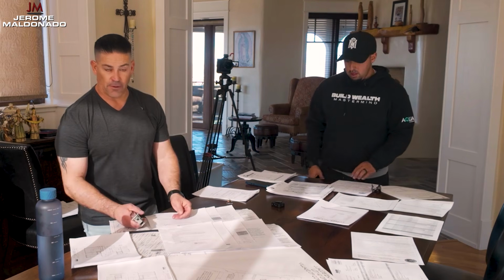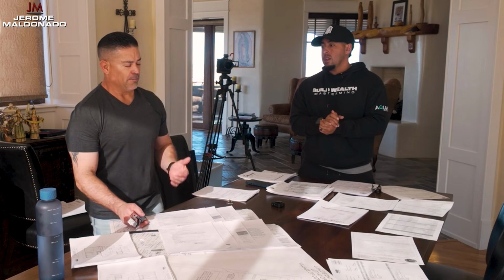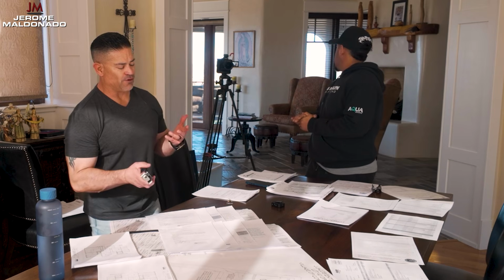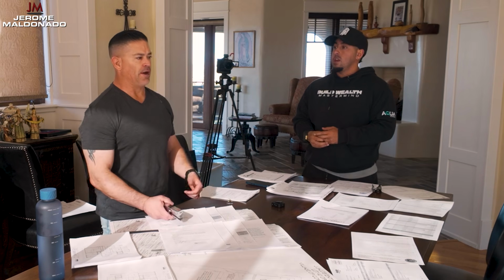They're not going to review it. They're not reviewing it there, but the deed will be in there. And then what will end up happening is they'll go through the entire plan review process. And this is very important that you pay attention to this, because most people will sit back and they'll wait. And so if you wait to close on the loan, and your plan review takes 3 months, now you have 3 months of your loan just sitting there stagnant.